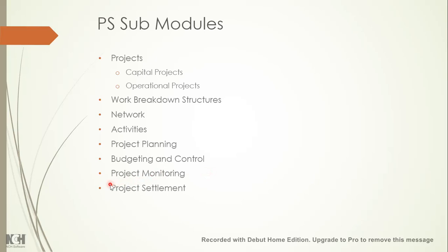Finally, you also need to learn how the project settlement works. In this case, when the project is completed or periodically also, you need to transfer all the amounts posted on a project to the GL account. As we learned earlier, SAP works on a sub-ledger concept. So project is also a sub-ledger. So you need to do the settlement on a monthly basis.